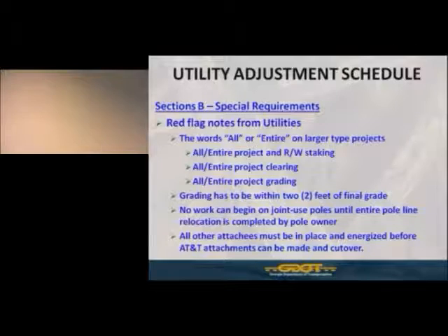Grading has to be within 2 feet of final grade. Now, if we have a large grade change on a project, 10, 12, 15 feet, that may be something that's reasonable to get some grading down, to cut a hill down, or if we're doing embankment fill, particularly for underground or even for pole owners, obviously, in order to achieve a reasonable location on those final facility locations. However,